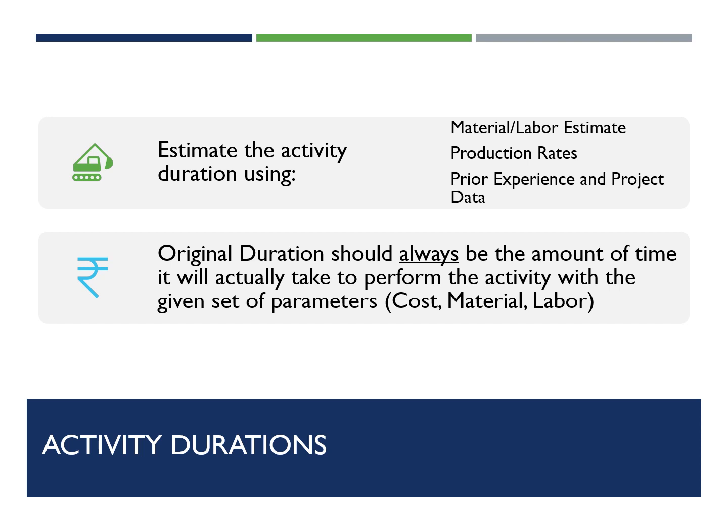If it's going to be a one-day activity, we need to call it out as a one-day activity, not a 5-day activity, because we'd like a window to make sure that we have the crew available and the weather is going to be good, and whatever other contingencies that you might build into a particular schedule activity to reduce your risk. Those sort of things need to be taken care of with another topic that we're going to talk about, which is calendars, not your original duration.